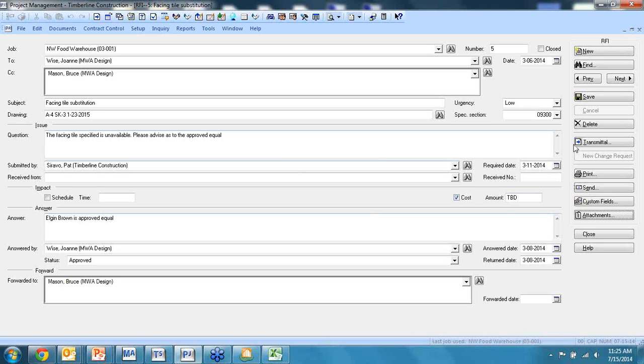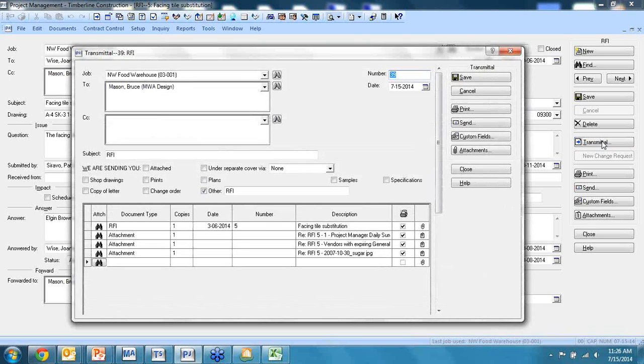So the idea with the transmittal and what happens within this tool is if we are going to physically send something, I may want to send a transmittal sheet with it. And in many cases, in most systems, that's 2 documents. I've got to go do the RFI, and then I have to do the transmittal. In our case, when I tell the software I want to do a transmittal, the software recognizes that it's being driven off of an existing RFI.